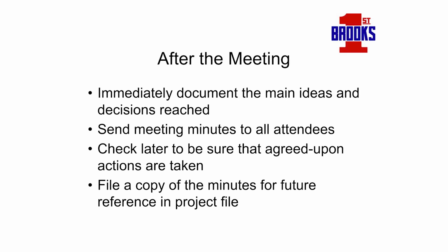After the meeting, immediately document the main ideas and decisions reached. You can send out meeting minutes, so then there's a record of what was discussed and what was decided, and the actual action plan. And then follow up later on to make sure that the actions have been carried out. And then file a copy of the minutes for later use if needed. So if there's ever a disagreement, you can always go back and look at the meeting minutes. You know, let's say a pre-con. How many times have people gone back and had to look at pre-con meeting minutes to see what was discussed or agreed to?